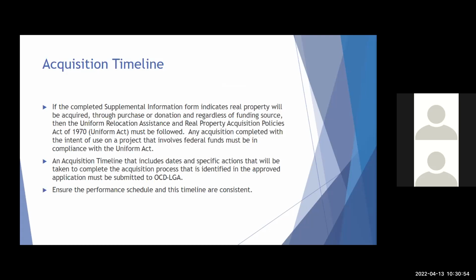If you identified on the supplemental information form that there is going to be acquisition of real property, then we're going to ask that you provide us with a timeline that includes dates and specific actions that will be taken to complete the acquisition process. We will be using this timeline as well to monitor your progress on your project. Make sure that your performance schedule that you complete and this timeline are consistent with each other, and the timelines will match up.